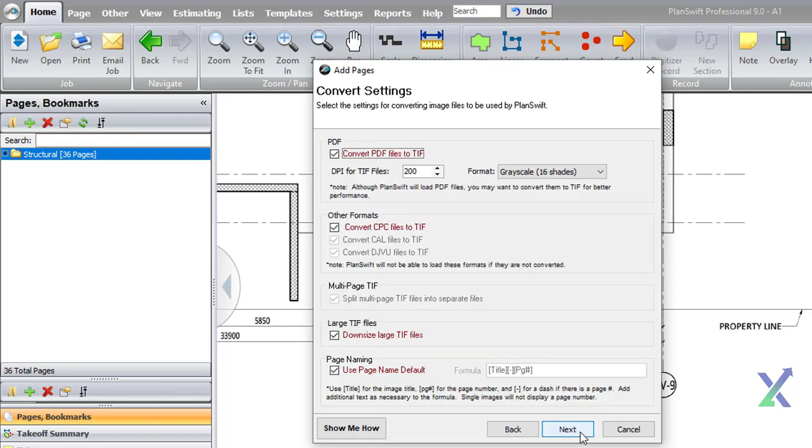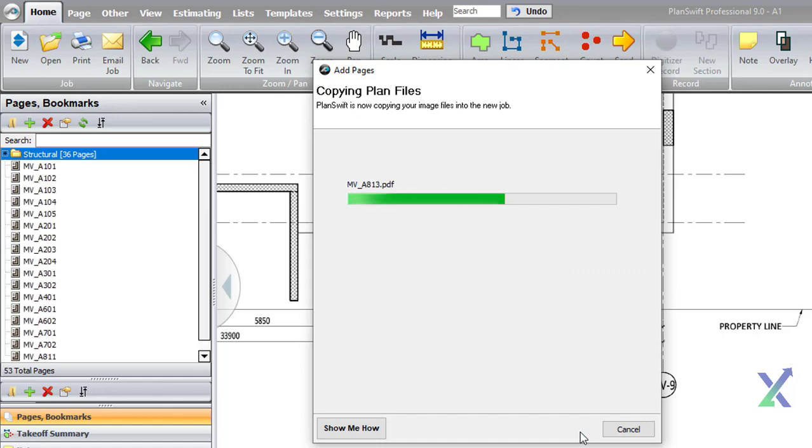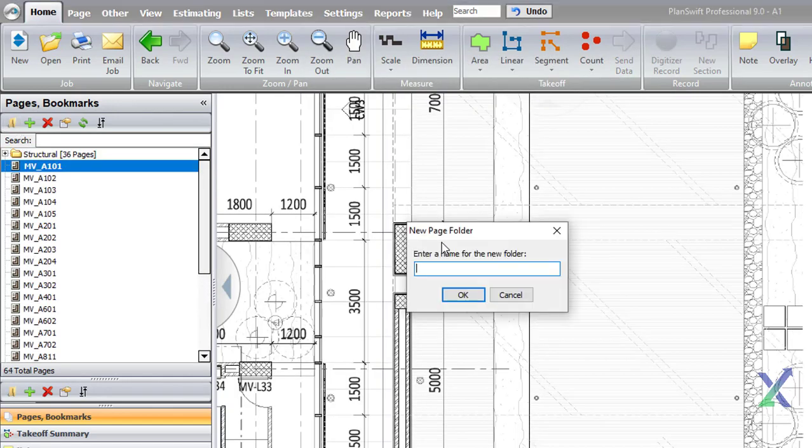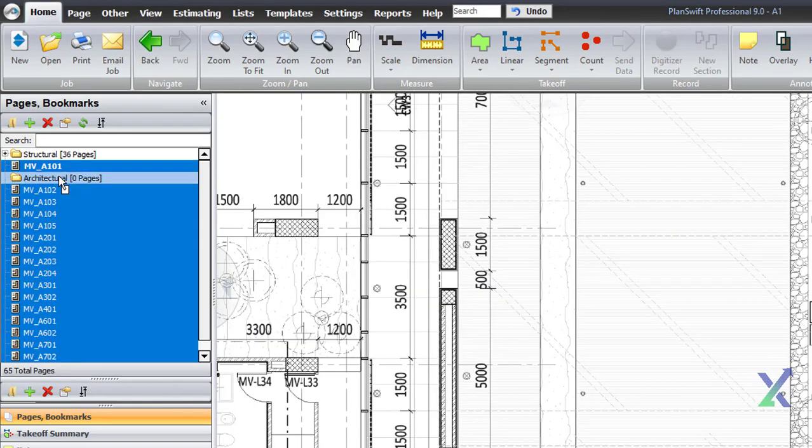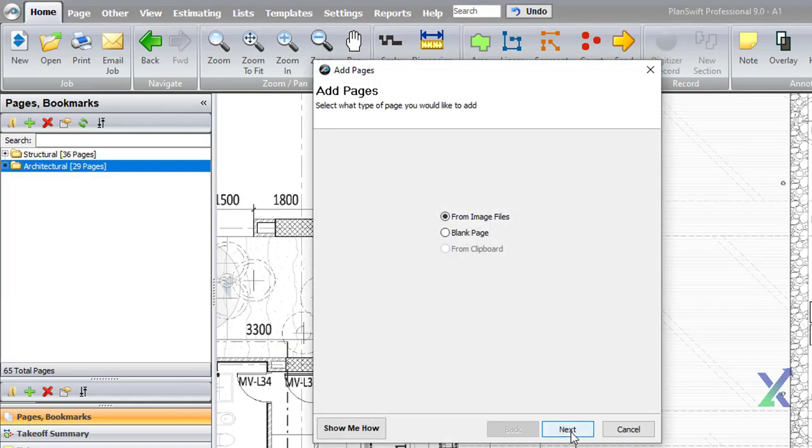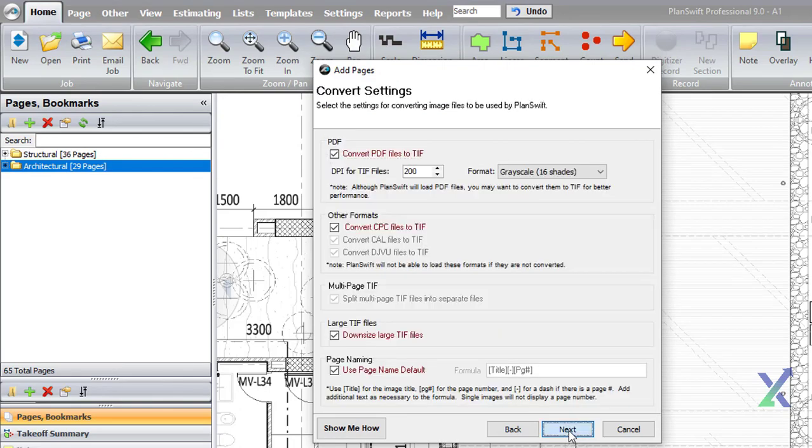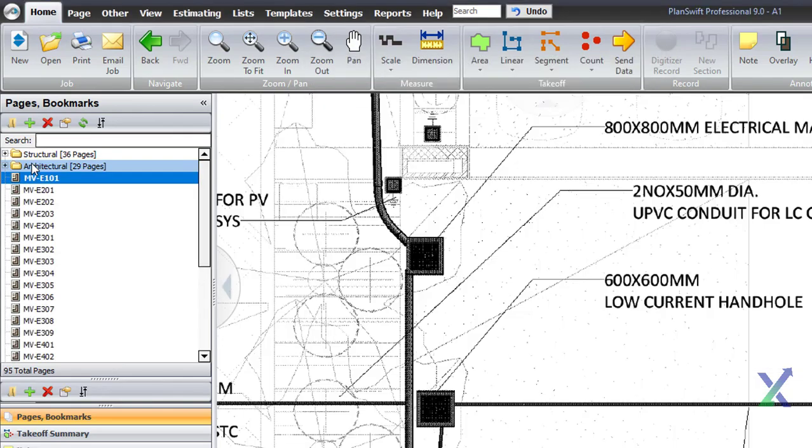Our goal in using PlanSwift is to efficiently review all the crucial drawing details required for creating our schedule. We will organize these details in a folder for easy reference and add estimates to create a more accurate breakdown of our project scope.